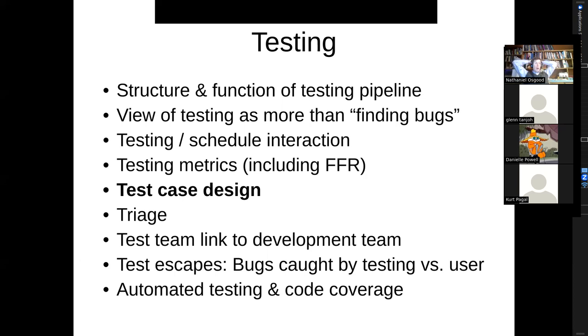And there was a comment in here, code freeze reduces the chance. Yes, exactly. So you have the code freeze in place, and that buys time to get maybe a few more cycles of testing in before you ship, before you give it to the user, right? Before it goes golden and you produce the final product. So you hopefully get a few more iterations of testing, debugging, fixing, and testing again, right? To make sure you haven't recreated that bug.